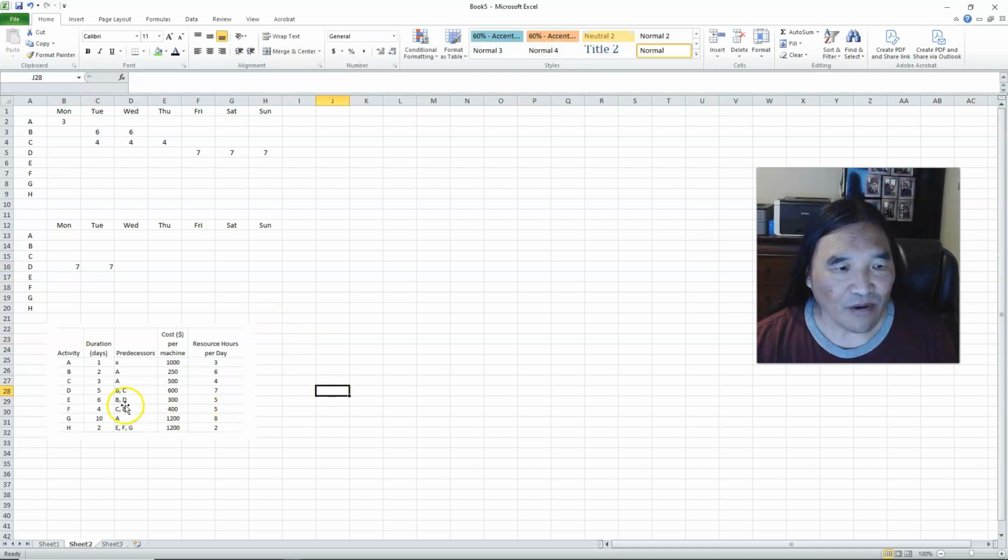That's it. And now if I wanted to do E, well, B is obviously over, but I have to wait for D to finish. So that means E can't start until here. And all you have to do is this a step at a time.